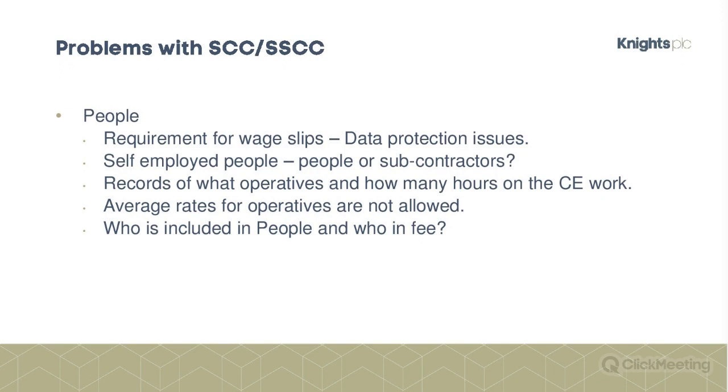So, if you've paid for overnight accommodation for them, for meals, for health insurance, if they have a company car, this is all cost, but you've got to arguably, strictly speaking, in accordance with the contract, you've got to evidence all this, which I think must be really tortuous, and can be a way that a project manager causes problems for contractors.